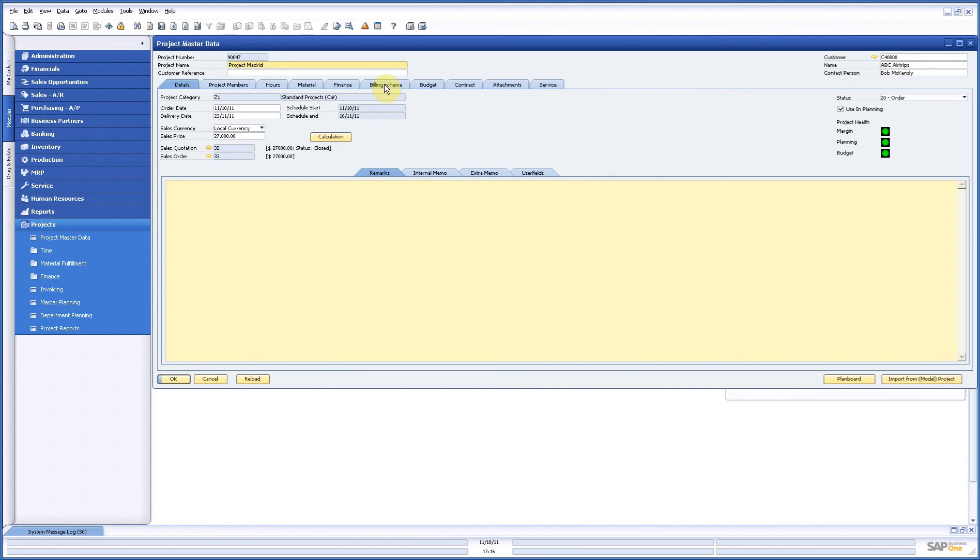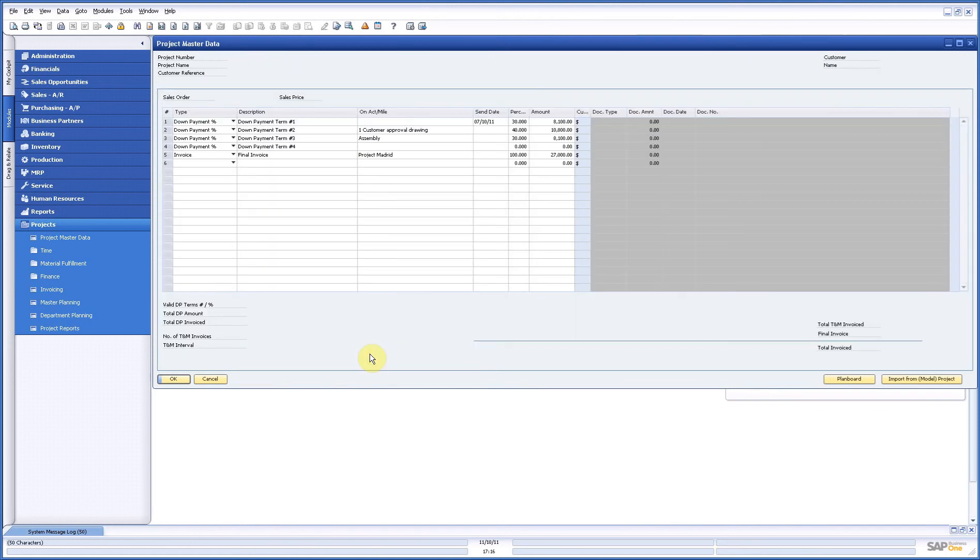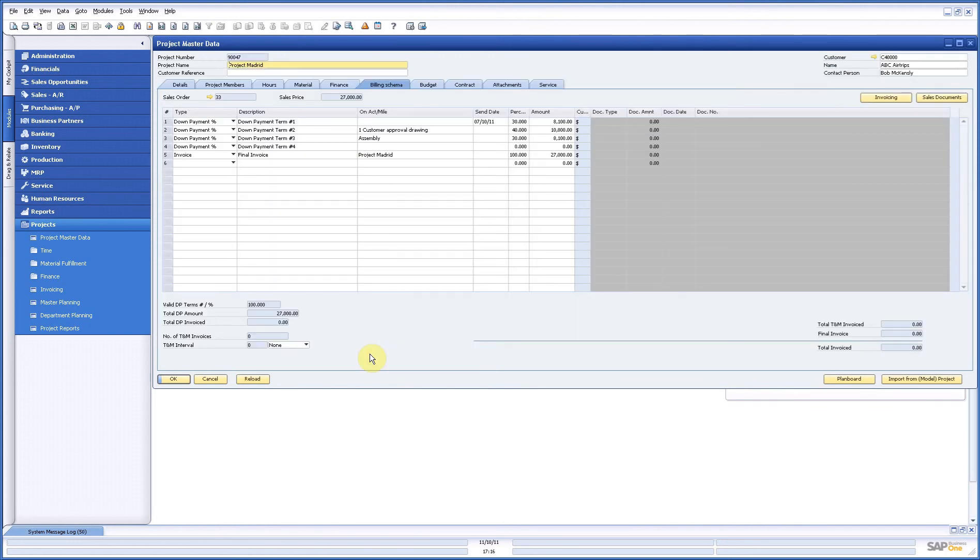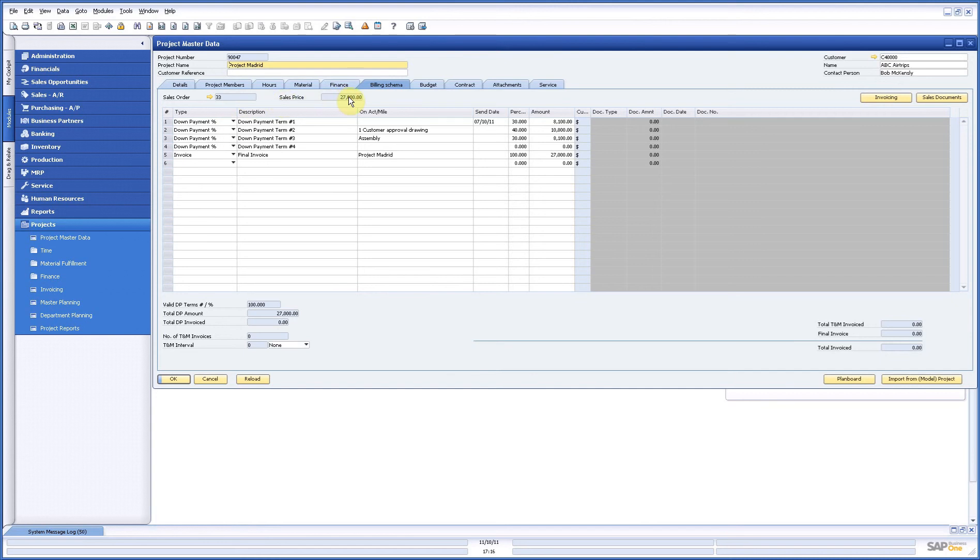Now the last step we have to do is first of all make a billing scheme and then do some invoicing. Now if we look at projects in basis you have two ways of doing invoicing. Either way you base your invoicing on a fixed price or you base your invoice on a time and material basis.